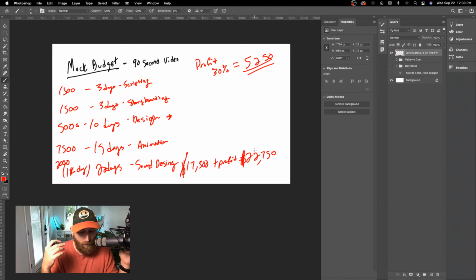So let's say we do 3 days of storyboarding or 10 days of design, and they come back and say, oh, we want to redo all of it. And you say, okay, we're going outside the scope, just a heads up. If we can get that budget approved, then let's go ahead and redo all the design, but we did chew through our allotted budget for design days. So even if you're not 100% sure, having any kind of scope is a good structure to say, here's what I will give you in terms of my time, and then you'll see if the scope plays out.